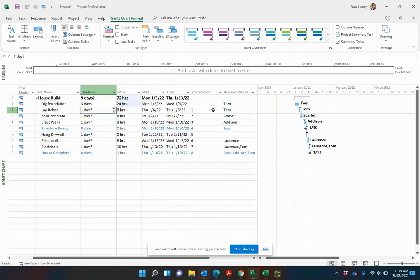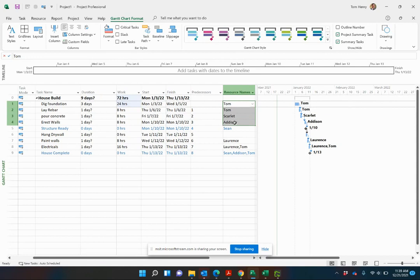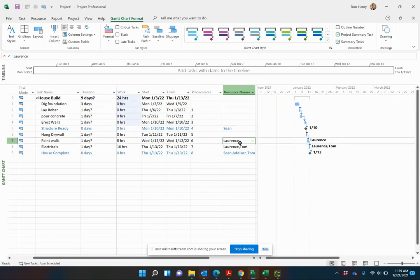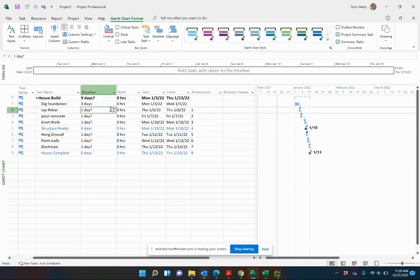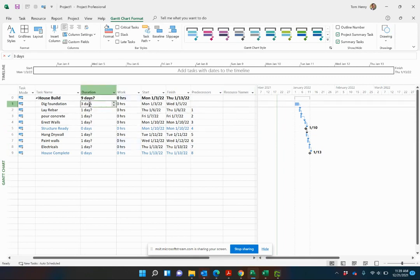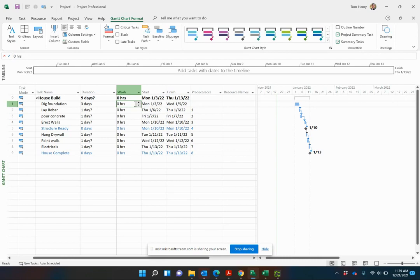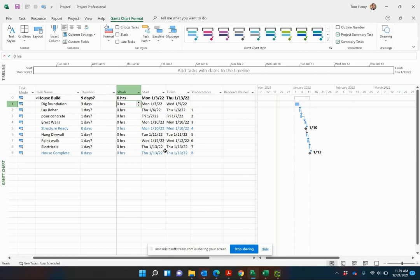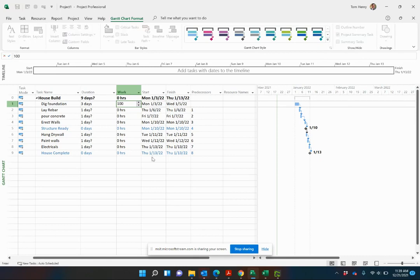Now, when you're going through an estimating, you probably want to be doing this before you've even assigned your resources. Let's remove the resources. So the first thing we do is estimate duration and how much work. To dig a foundation, it's generally a crew of people and it takes them 40 hours for a week. If there's a crew of people, three on the crew, takes them three days. I estimate that the effort for that is probably around 100 hours of actual labor.